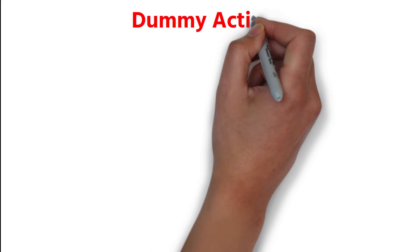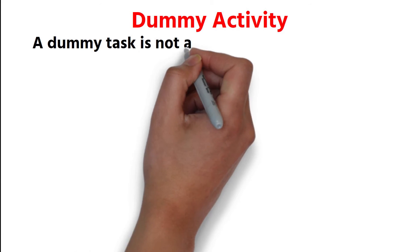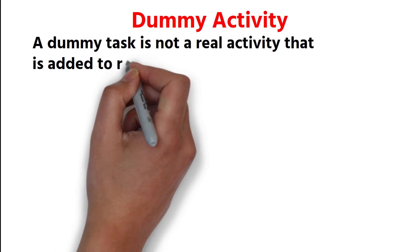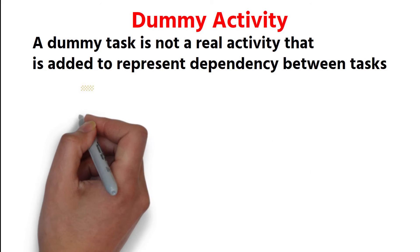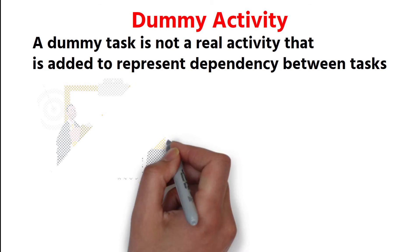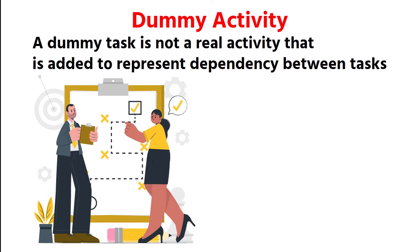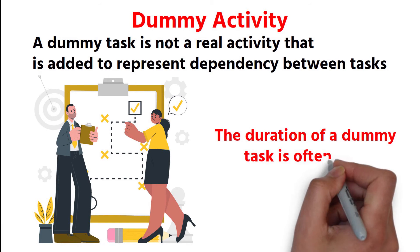Dummy activity. A dummy task is not a real activity that is added to represent dependency between tasks. It can be used to separate tasks or to keep the sequence correct. The duration of a dummy task is often zero.